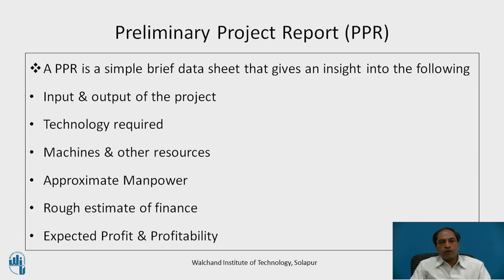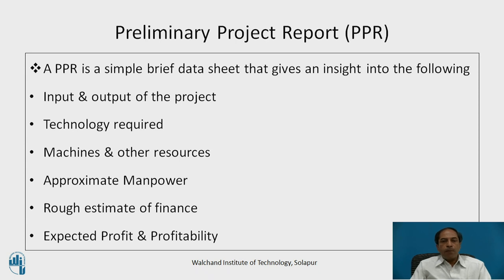The second element is technology required — what are the technology inputs needed for the particular project, machines and other resources. Other resources include infrastructure, land, building, and other things, hardware, software, and approximate manpower required. Manpower may be in a variety of categories: workers, supervisory, and managerial.